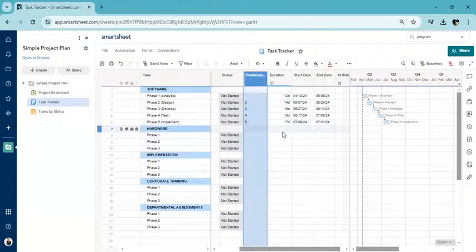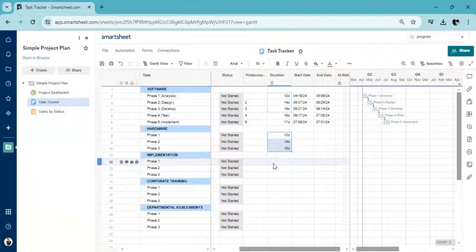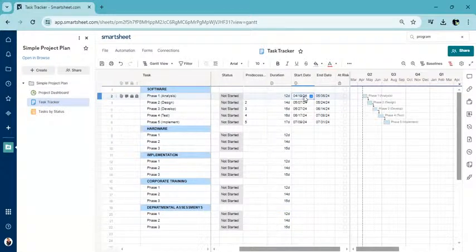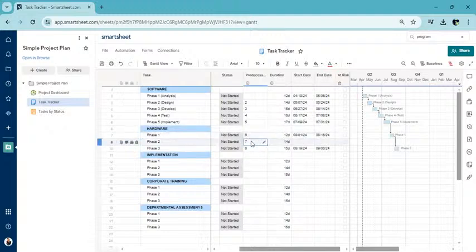So same for this. We could just take these as a dummy, put them here. And this is how you will track like 5 projects, 1 spreadsheet, minimum amount of information. Remember how we do this? We're going to make this a predecessor. So this should be 6, and then 7, and then 8. Did we get it? 6. Oh, this will be 8 and 9. Like that, if they are really joined in that way.